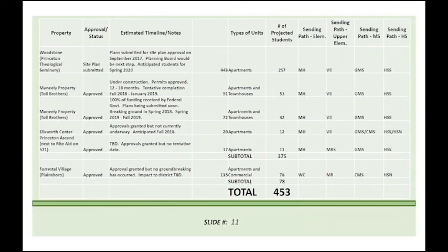And so that's sending it to Wyckoff. Everything else is sending Maurice Hawk, Village, Grover South. Right? Maurice Hawk, all this stuff is sent into Hawk. And that's why we're moving fast on going through the process of capital reserve dollars, because that's separate than the referendum, and it saves about a year on the process. And that's one of the reasons we went the direction we went with Hawk, because time was of the essence.